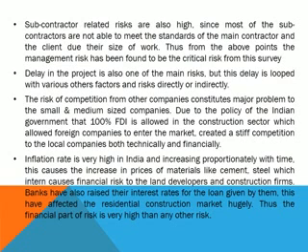The risk of competition from other companies constitutes a major problem to the small and medium-sized companies. Due to the policy of the Indian government that 100% FDI is allowed in the construction sector, foreign companies were allowed to enter the market, creating stiff competition to the local companies both technically and financially.